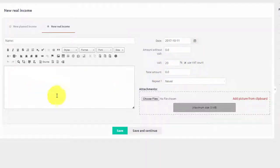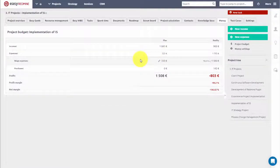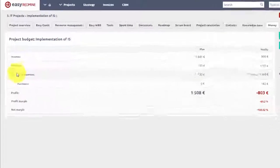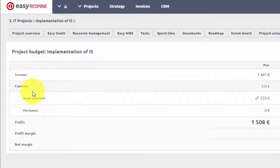The key benefit of Easy Redmine budgets is the automatic calculation of wage expenses, which are seen here based on time spent by users, which is logged in Easy Redmine using time tracking and multiplied by hourly rate.